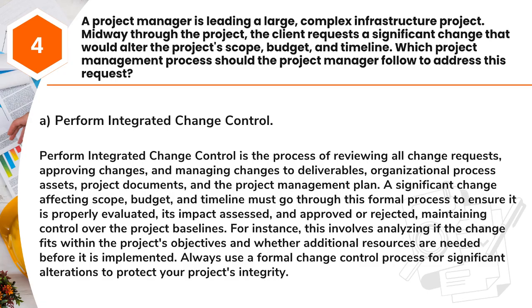For instance, this involves analyzing if the change fits within the project's objectives and whether additional resources are needed before it is implemented. Always use a formal change control process for significant alterations to protect your project's integrity.